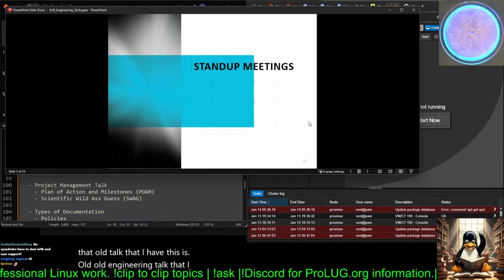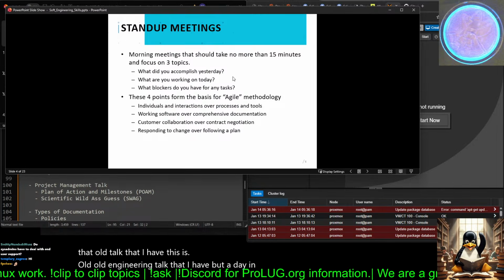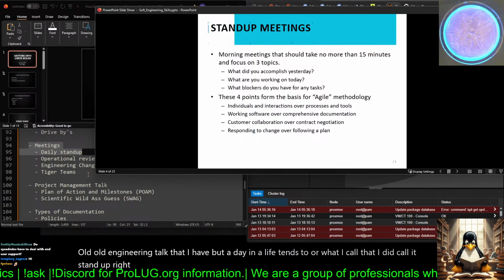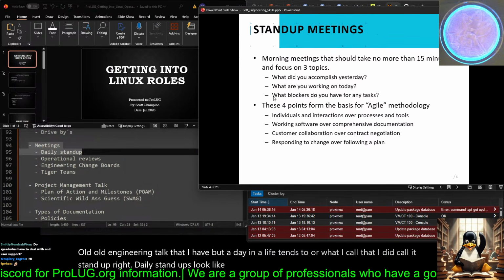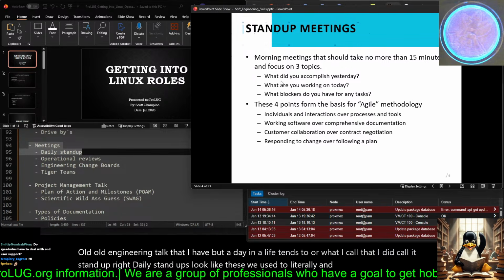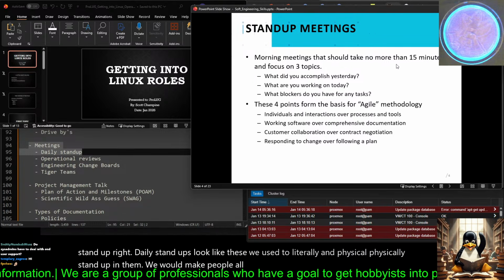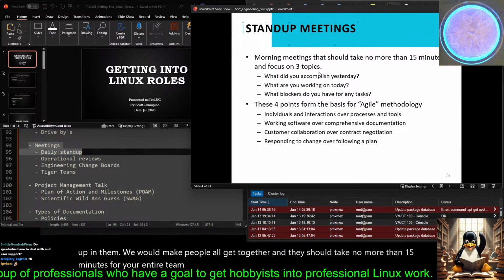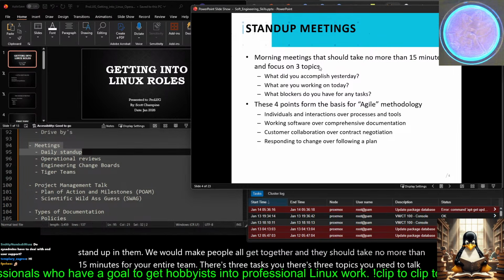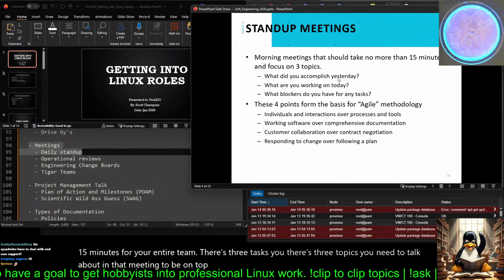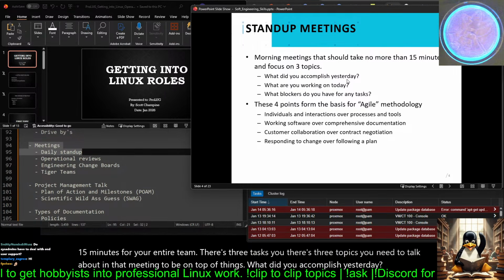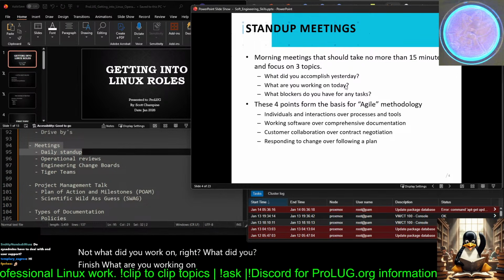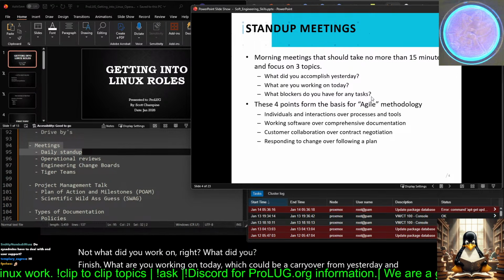A day in the life tends to, what did I call that? I did call that stand-up, right? Yeah, daily stand-ups look like these. We used to literally and physically stand up in them. We would make people all get together, and they should take no more than 15 minutes for your entire team. There are three topics you need to talk about in that meeting to be on top of things. What did you accomplish yesterday? Not what did you work on, right? What did you finish? What are you working on today, which could be a carryover from yesterday? And then what blockers do you have for tasks?